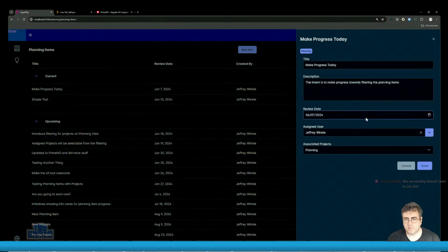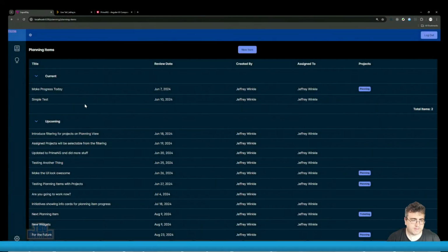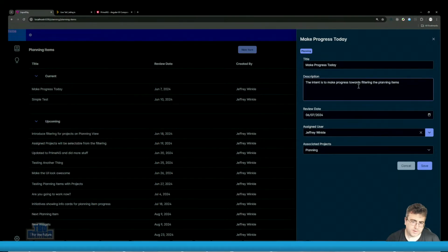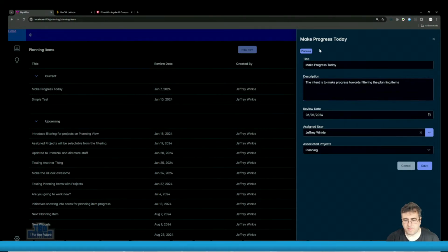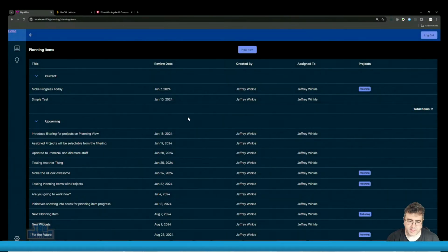Right now the focus is on that planning, because this tool is intended to be product driven, but involve the developers so that no stories are created without that developer review, right? So the idea is that the developers would look at this with the planner or with the product manager or whatever, review the actual requirements, and define what the actual stories are. So the aim there is to cut down on the amount of fluff that gets added as stories. I've seen stories that read like entire books, but they're a copy and paste of another story because it was too hard to capture the slight difference in requirements between story A and story B. So the requirements get copied to each story, but you don't know which one's doing which, or the stories have no definition, or the stories have no requirements.